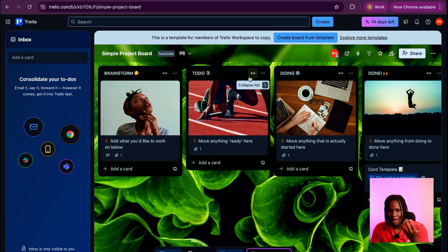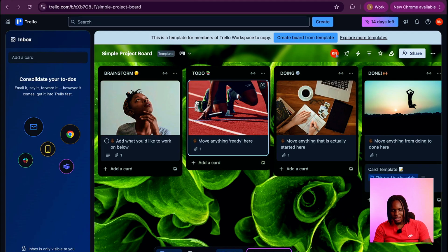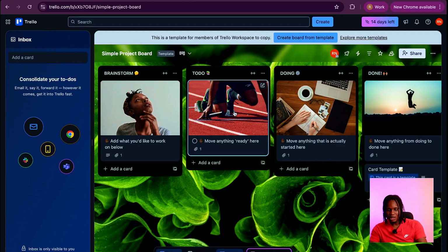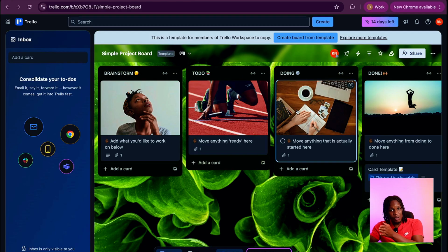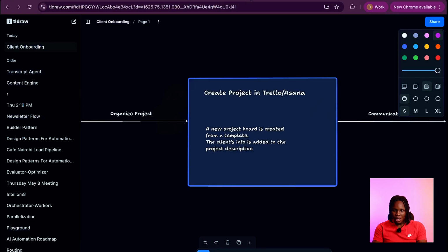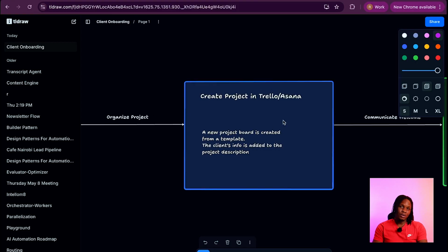I think they call them Kanban boards. So when something is brainstorming, it's in that particular card. Then it moves on as a to-do. It becomes a list of to-dos. Then if something is in progress, it moves to a different card, and then if it's done, so you can track what's still in progress and what's already done. Very, very simple, right? I'm going to say simple a lot of times. If you drink every time you hear me saying simple, I don't think you'll make it to the end of this video.